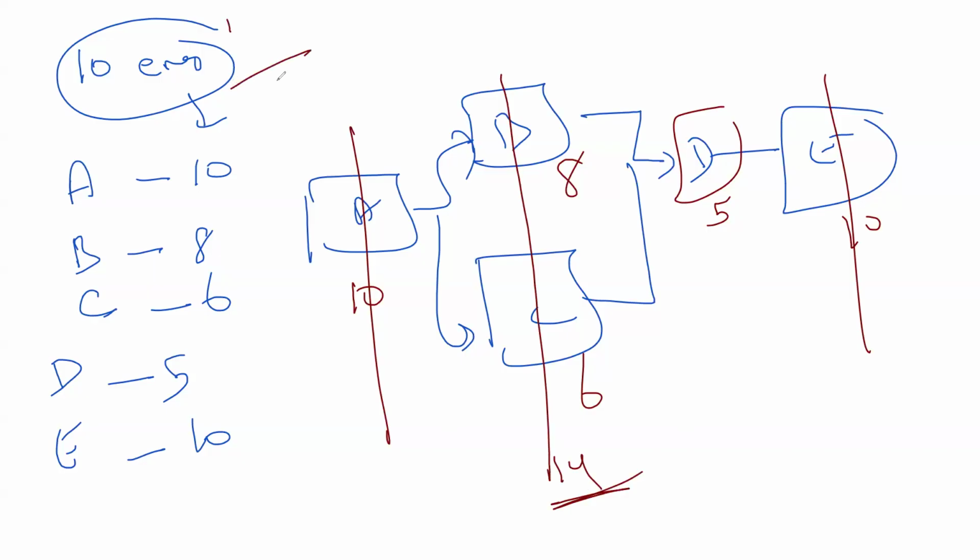This is called resource over allocation. But on another day, when D is happening, you're utilizing only 5 resources and other 5 are idle. This is under allocation. Over allocation and under allocation are inefficient.